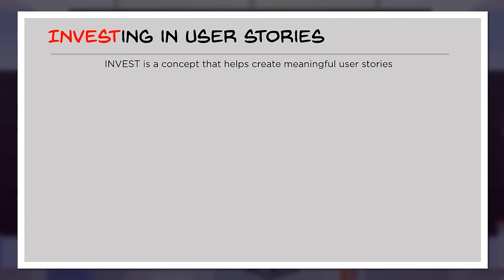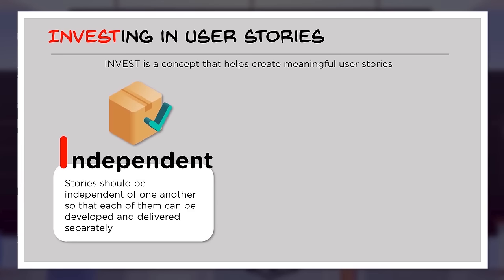When I say independent, whenever we write a user story, it should be self-contained, if at all possible, to avoid dependencies on other user stories. So it should be independent of one another so that each of them can be developed and delivered separately.